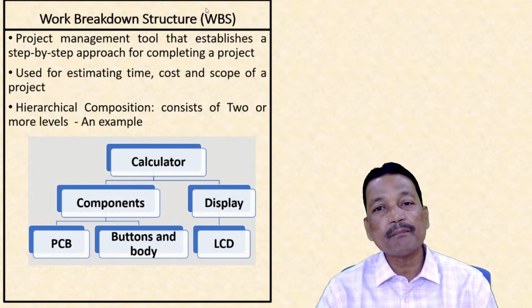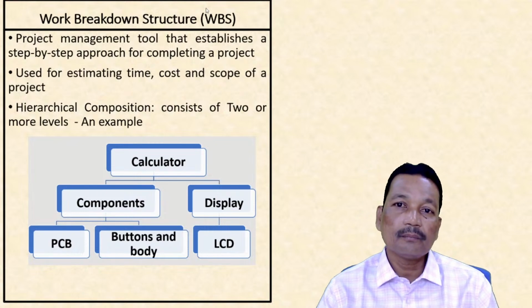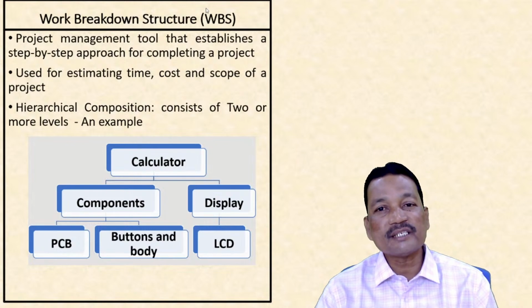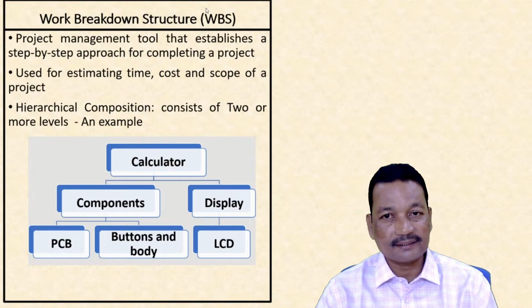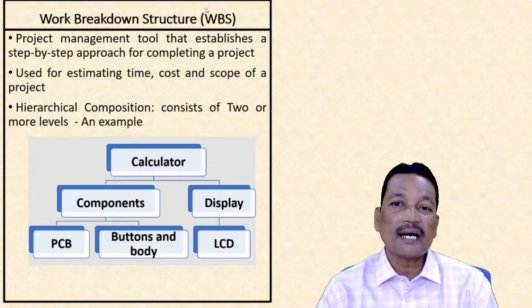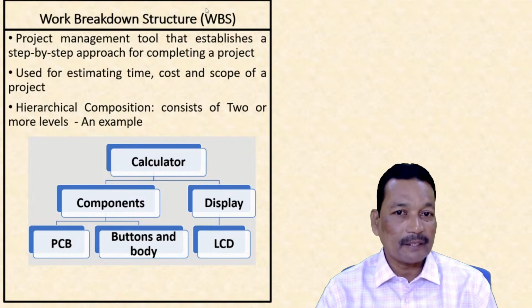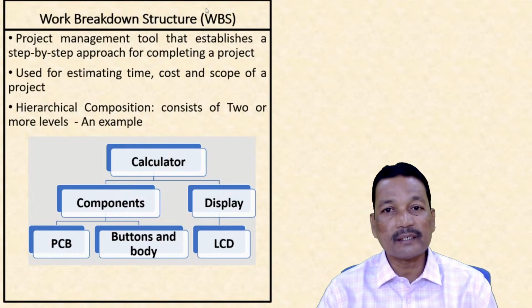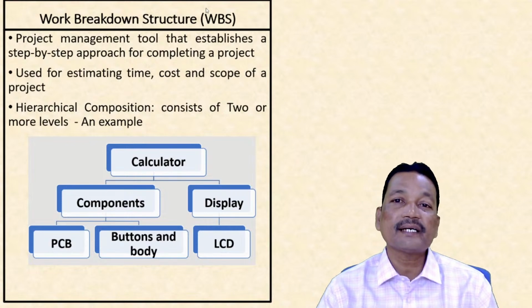Now, once the frame is received from the fabricator, we fix the board using the screws immediately, so that we can say the project is accomplished in 10 days. We do not ask the iron fabricator to create the wooden board, or the wooden carpenter to create the screws.